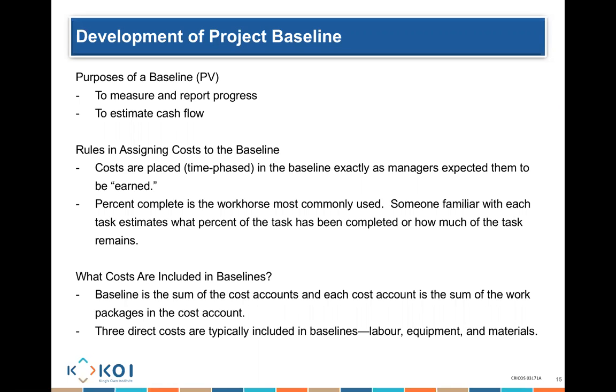There are various rules we follow to decide how we're going to assign a cost to the baseline. Some people, for example, put costs exactly as the managers expect them to be earned. So if the manager expects that I am going to finish this task in week 8 and spend a whole $100, I'm going to do all of these things in week 8. We put the whole thing in week 8 because that's how we're going to get the job